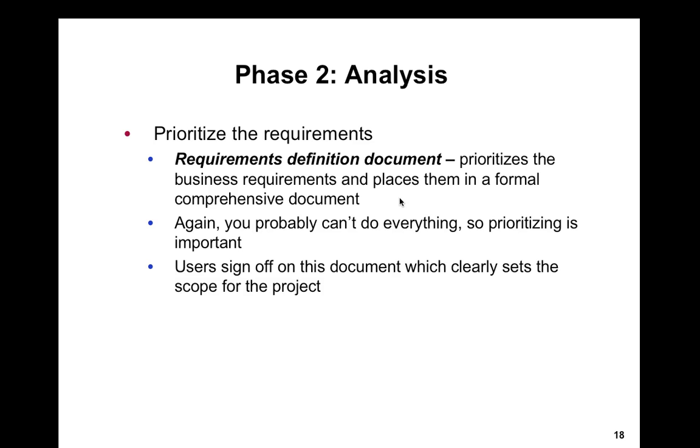So you take this list of documented requirements and get it signed off on. You get your boss to say, oh yeah, this is good. And then most importantly, you get the customer, or the end users, or the department if you're doing an internal project, insourcing it, to sign off on it, to say yes, this is going to meet the requirements and solve the problem that we requested to be solved.